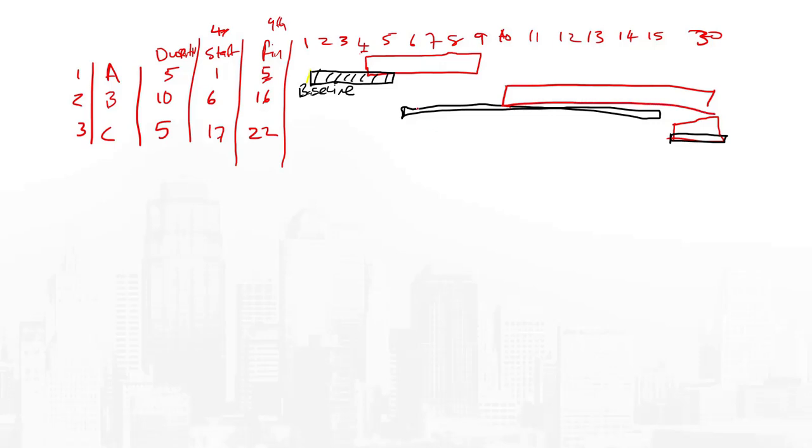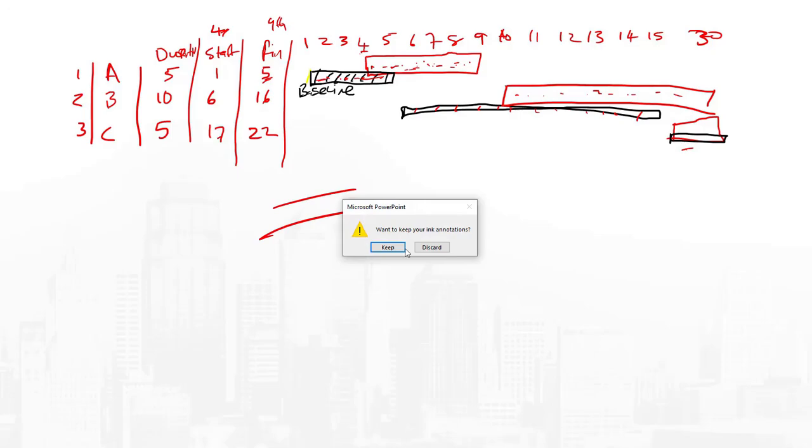So in the course of your analysis, what you're now going to be on the lookout for would be, okay, from the Gantt, have my bars changed? In other words, are they beginning to shift from the baselines, or are they still aligned with the baselines in the course of the project implementation? So once you see that there is a difference between the baseline bar and the actual implementation bar, then you know that, okay, for this activity, you already have a variance, and then you can begin to track where the variance is coming from and understand exactly what is happening. And so all of these we're going to be showing in Primavera P6, and that's what we're going to be taking a look at next.